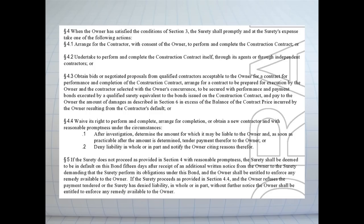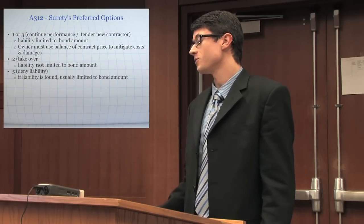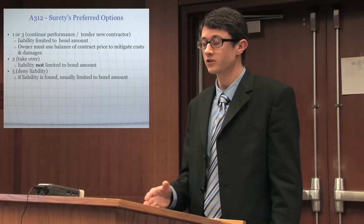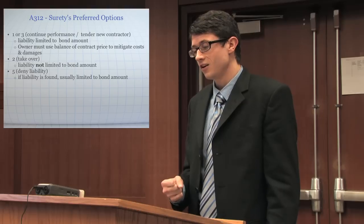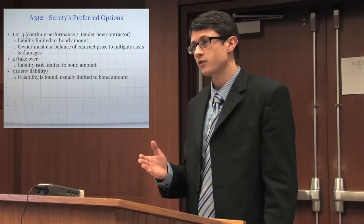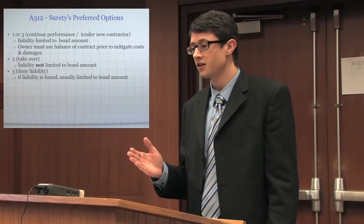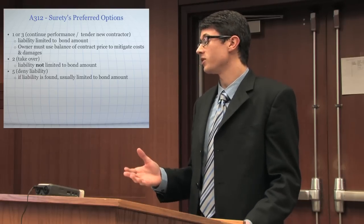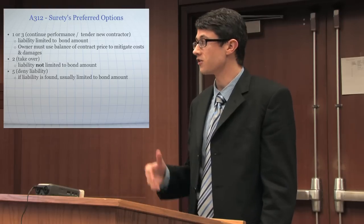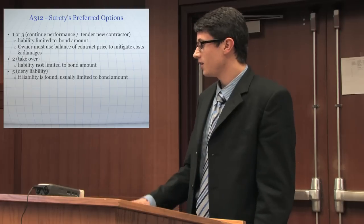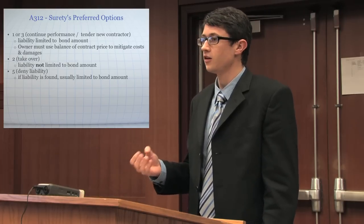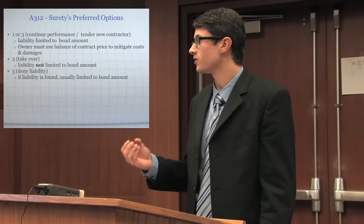Some options are simply better than others. The first or third option — getting the original contractor to complete performance or tendering a new contractor — may be best because the surety's liability will be limited to the bond amount, and the owner will be under an obligation to use the balance on the contract price to mitigate costs and damages. The second option, taking over the contract itself, is not as good because the surety's liability won't be limited to the bond amount and it could end up paying far more than it bargained for. Even if the surety denies liability, the amount it will ultimately be liable for is typically still limited to the bond amount.